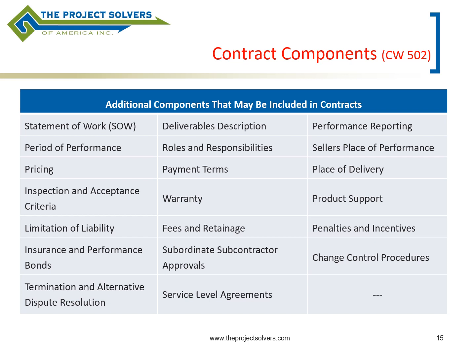What is the list of the deliverables that are going to be provided? What are the main roles and responsibilities of the applicable stakeholders? And are you allowed to subcontract? Once the contract is complete, is there going to be a service level agreement? Where is the contract work going to take place? Where is the result of it going to be delivered?